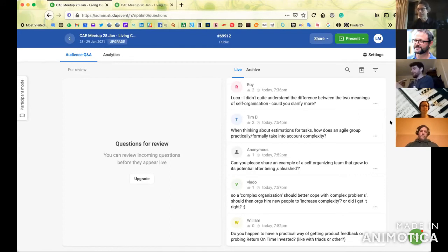The simple one, you can commit. The ones that are less complex, you can commit with the estimate that you have, and you can use buffers, eventually a small buffer, to make sure that if something goes wrong, you still manage. For those in the middle, you know that in an agile way, you have to iterate. You know that the error can be as big as 20% or more,